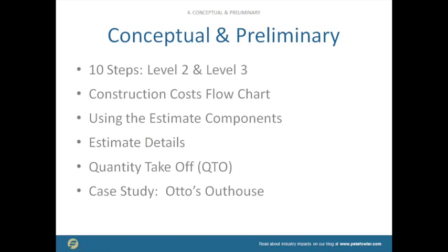And if you're doing this in an estimating program, or you're using a standard format like MasterFormat or MasterSpec or Uniformat, you would have every room you went into to identify these quantities, you would list them in the same order. All right?